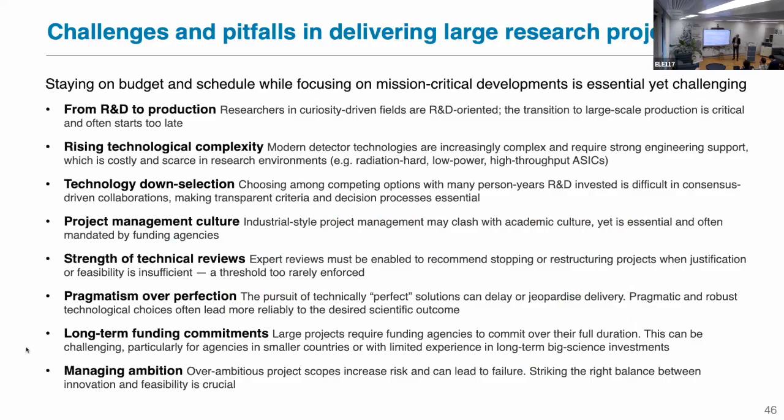So for example, from R&D to production, the first point: we're all physicists, we are curiosity driven. We love R&D. And then the transition to large scale production is very critical and often starts too late because we just want to continue to invent and not start to produce. It's very difficult, this part.